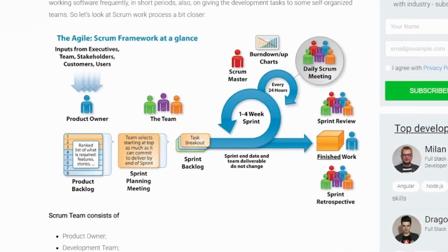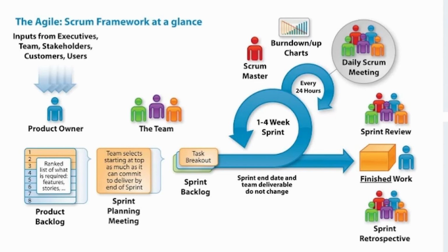If we're talking about the agile, quite often it means that you have a group of people and you define the time scope or time window, two to three weeks. Your team takes 10 to 15 work items to work on within these two weeks. At the end of the two weeks, or so-called sprint, you show to a customer or representative of a customer the work done, and also you check what is left, and then leftovers will be transferred to the next sprint, and then you plan your work based on updates from the customer.